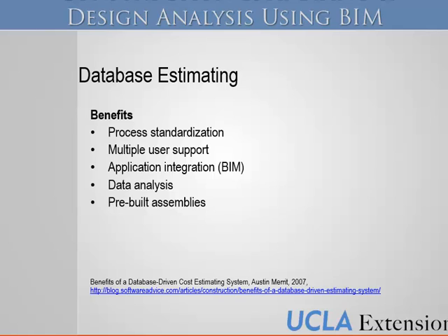Some of the key points: we call it a database estimating program, something where you have a whole shopping list of items already built in that you're drawing from. Being able to standardize your estimates is a very important part of estimating. If you have a standard estimate, that means my concrete item is always called this special name.